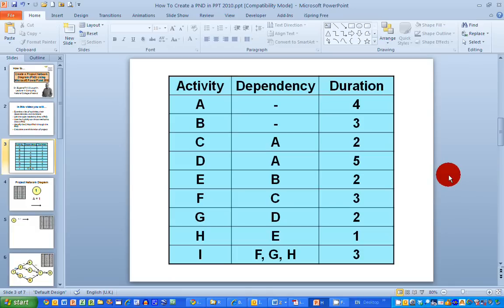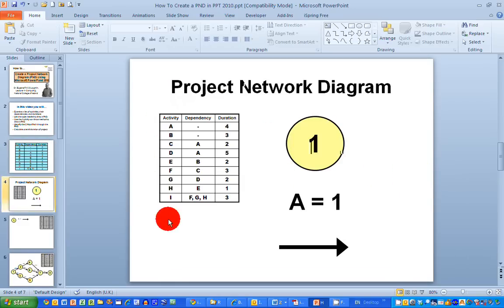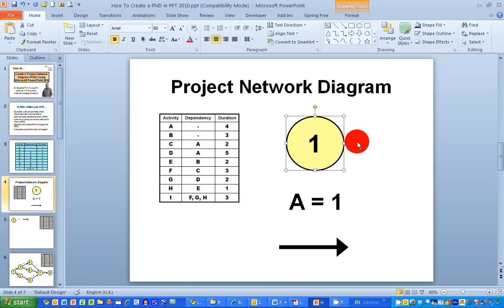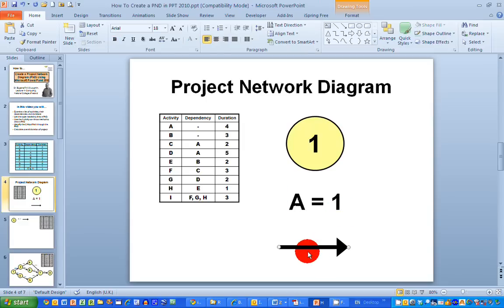I want to draw a simple project network diagram using this information. To draw a project network diagram, we really need three items: we need a node with a number in the center, we need an activity name and its duration — so activity A has a duration of one day in this example — and finally, activities are represented by an arrow, hence the name activity on arrow type of diagramming.